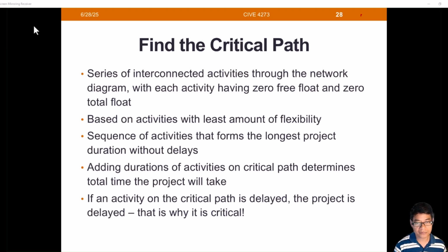If you look at the sequence of those activities and add the duration along those activities, that's the longest path. That's the longest path within this schedule. In the network diagram, based on the connection of the different activities, we have multiple paths linking towards the end of the project. The critical path has the longest path in time. If you add all of those activities together over the path, that's the longest one. If you add duration over the critical path, that will be the same as your project duration.